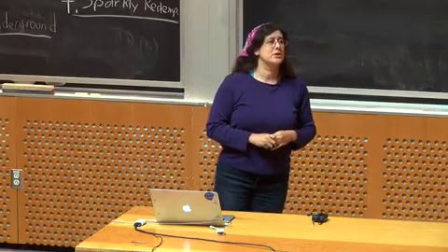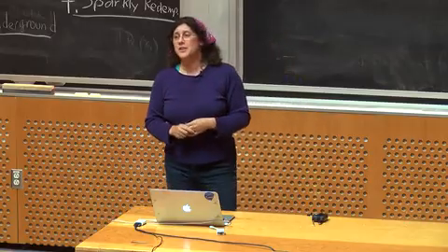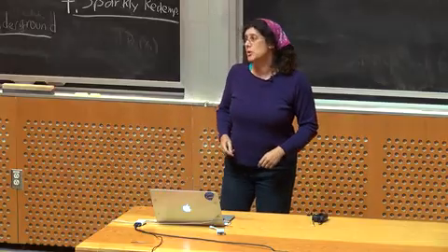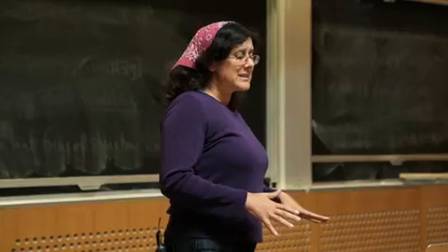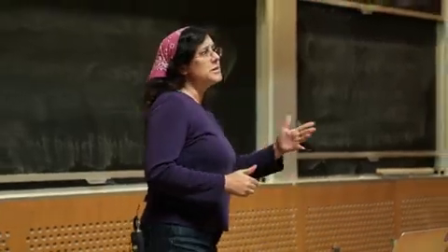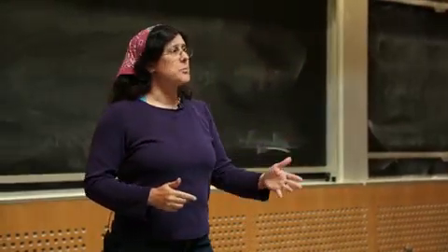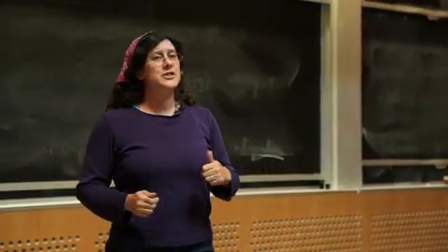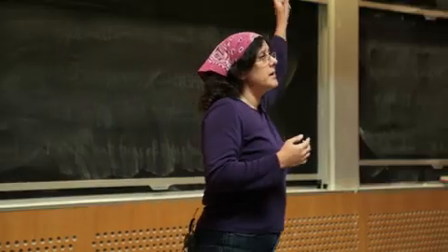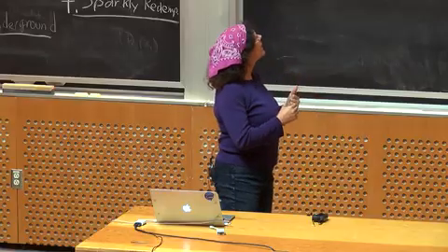Daily scrums are also called daily stand-ups because a lot of teams do them standing up in order to keep them short. Classically, it's time boxed at 15 minutes. For teams your size, 5 to 6 minutes is probably enough because all each person has to do is stand up and answer these 3 questions.